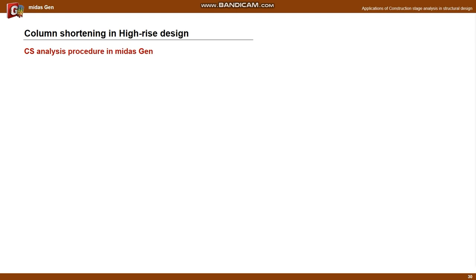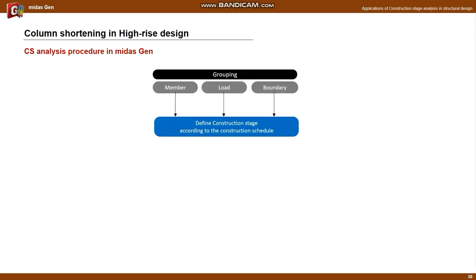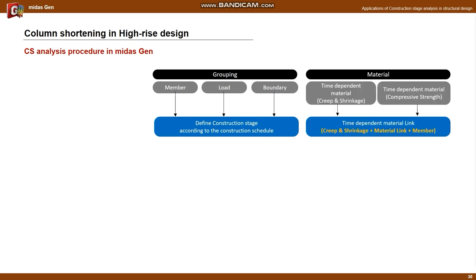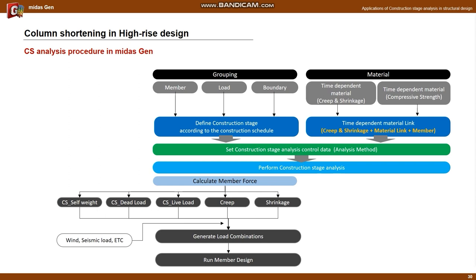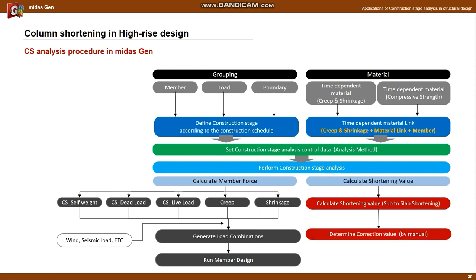The following is the progress of the column shortening project using General. First, create groups for members, loads, and boundary elements in order to set the construction stage. According to the construction schedule, group information should be assigned to define each construction stage. Next, define the time-dependent material properties such as creep, shrinkage, and compressive strength, and link each defined material property to each member. Analysis is performed using the defined construction stage and inelastic material information. We can obtain the member force for each gravity load, creep, and drying shrinkage through this analysis, and can create a load combination including wind and seismic load. It is then possible to do a design that reflects the column shortening using these load combinations.